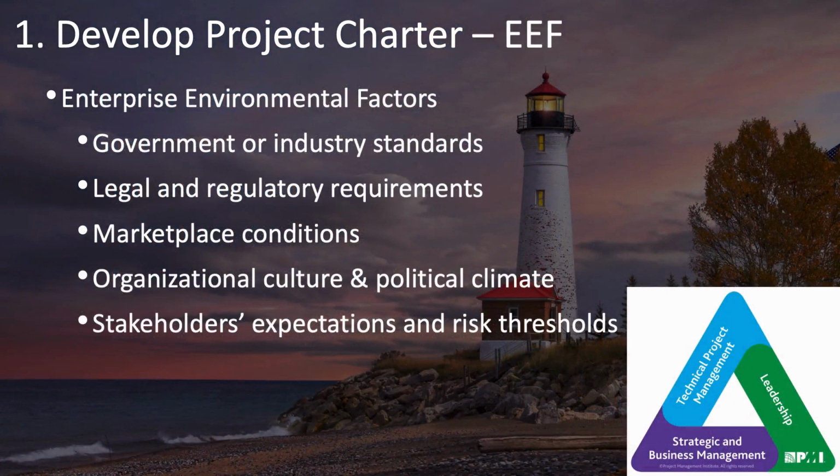Some of the enterprise environmental factors that are inputs to the develop project charter process include government or industry standards and legal and regulatory requirements. Examples of standards and regulations include standards specifically for the product, quality standards, safety standards, workmanship standards, equipment operating and maintenance standards, building codes, Department of Defense regulations, FCC regulations, OSHA, which stands for Occupational Safety and Health Administration, applies to many different industries.